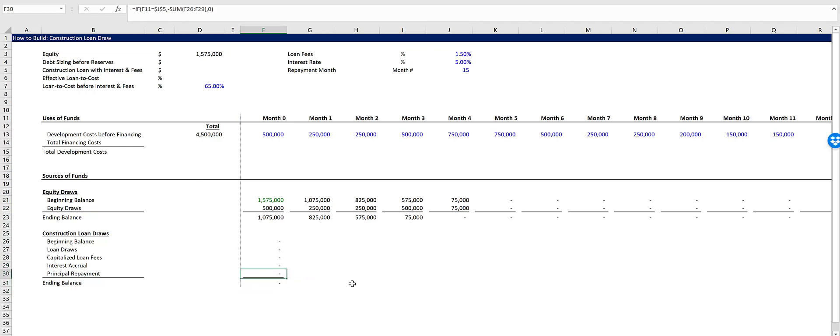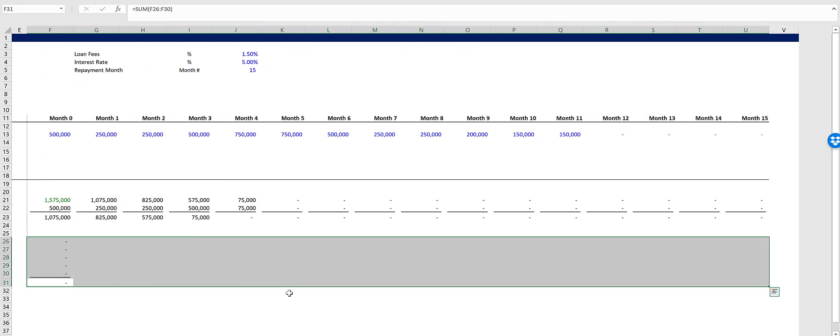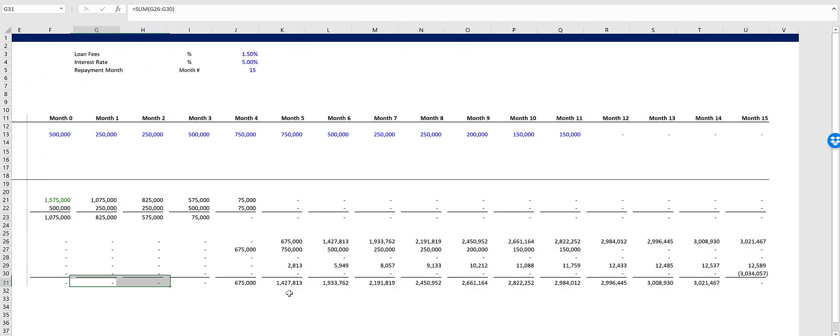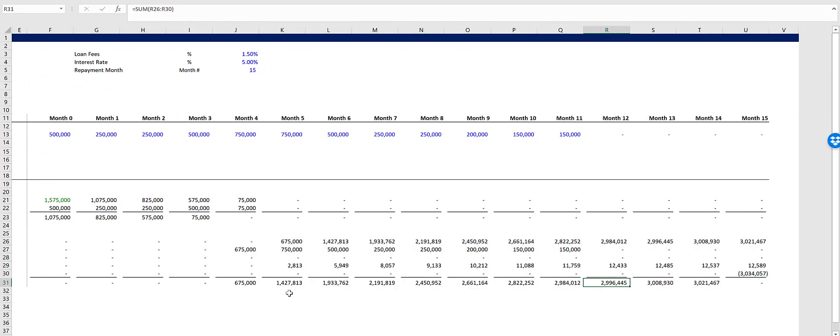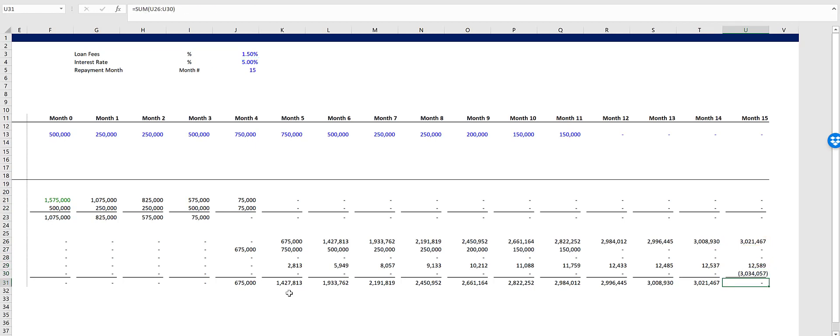So the principal repayment, we're saying we want the negative sum because we want this to return a negative so we can sum it all up. And watch. We'll copy this across using control R. And here we go. We repay everything, $3,034,000 and change in month 15. And that's the previous month's ending balance plus our interest accrual for that period.